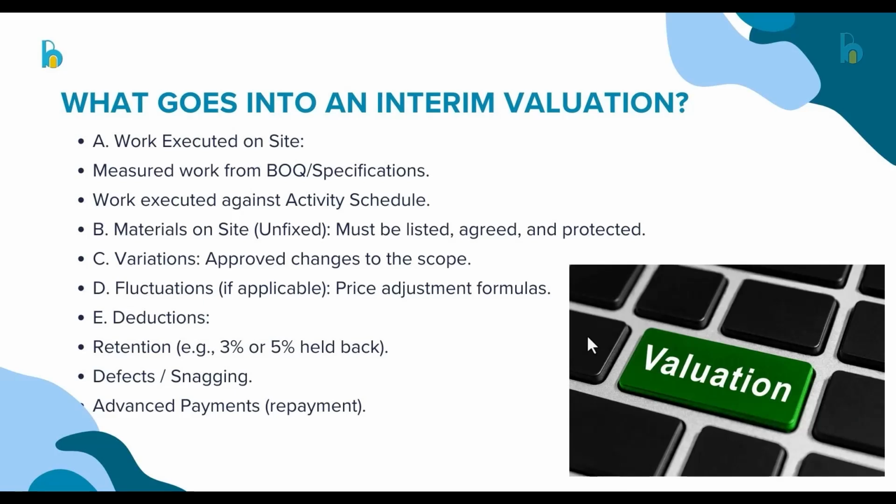Then we have the deductions, which we do within preparation of interim valuation. In those deductions, we have the retention, which is mostly 3% or 5% held back, depending on the contract agreement. Then we have the defects and snagging. The defects are issues that need to be corrected, and the snagging is mostly done after the project has been completed.